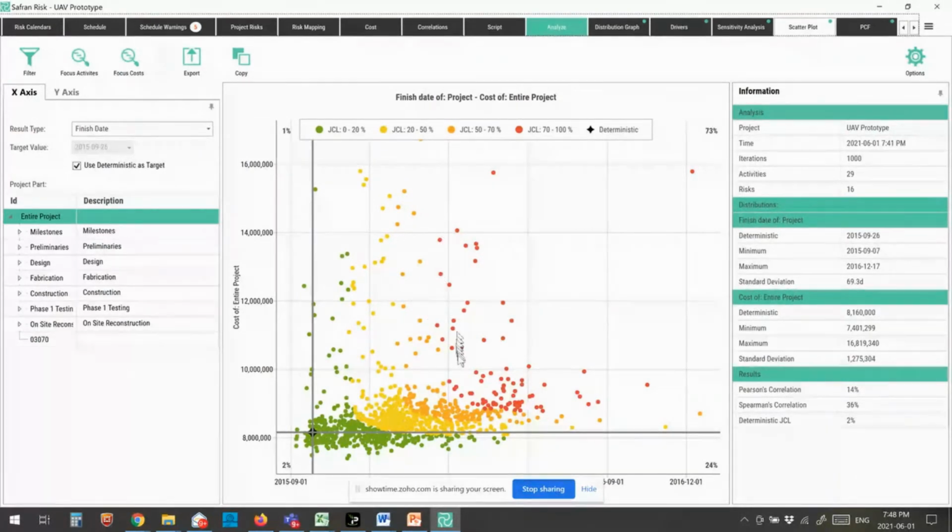Similarly, when it becomes horizontal, the system's saying, okay, you can give up as much time as you want, but you're not going to save any money. So the project team, though, can manipulate their targets within a range here where there's a curve. Where it goes from being totally vertical, it curves down and becomes totally horizontal. And in that area, or that continuum of points, I can make some trade-offs. I can say, okay, I can spend a bit of money and I can save some time.